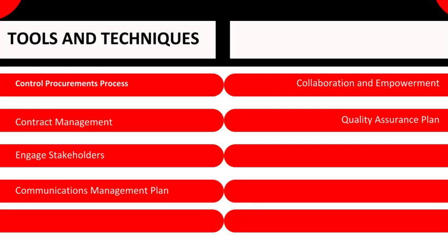An organization's procurement, purchasing, and legal departments should have reliable contract administration expertise, but the project manager or team lead administers the procurement for the project. The procurement department is responsible for developing and managing contracts with external suppliers. However, the project manager or team lead is responsible for administering the procurement for the project. This means that they are responsible for working with the supplier to ensure that the goods or services are delivered on time, within budget, and to the required quality standards.